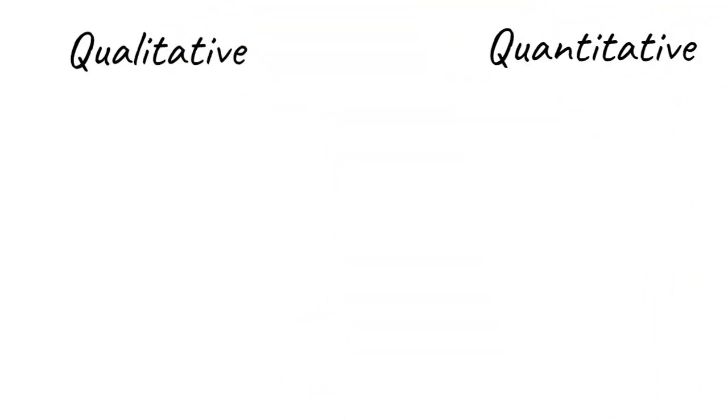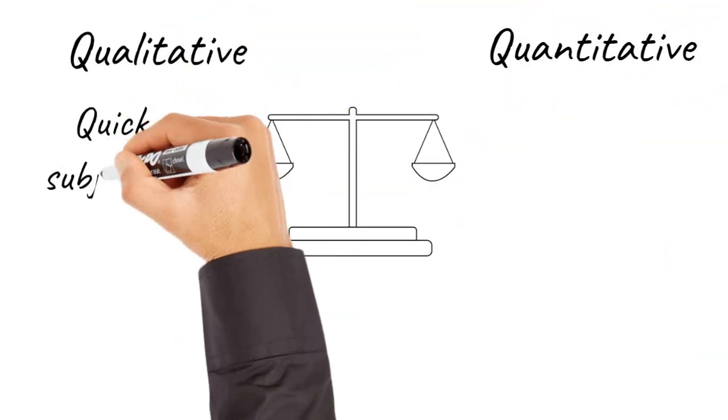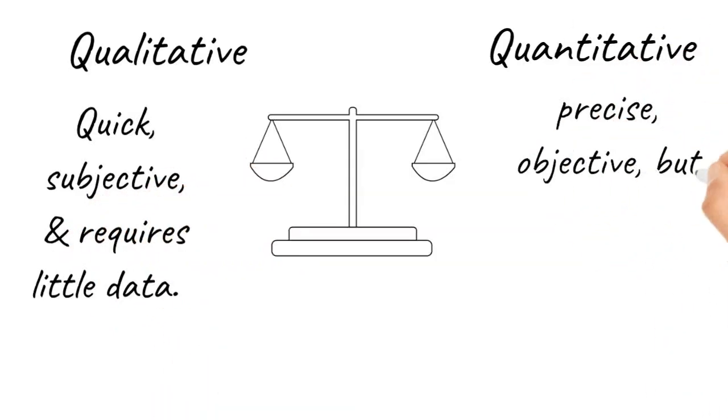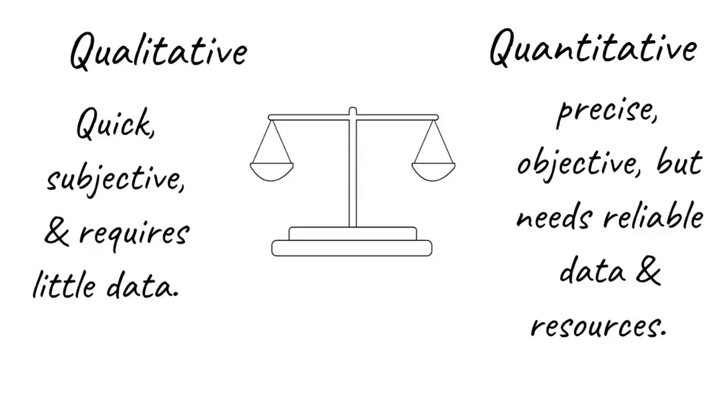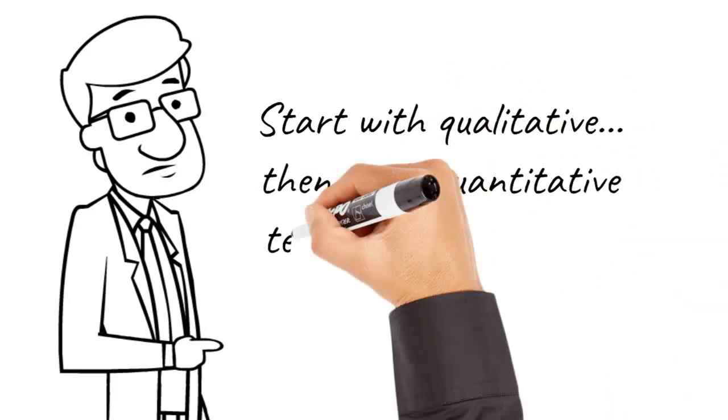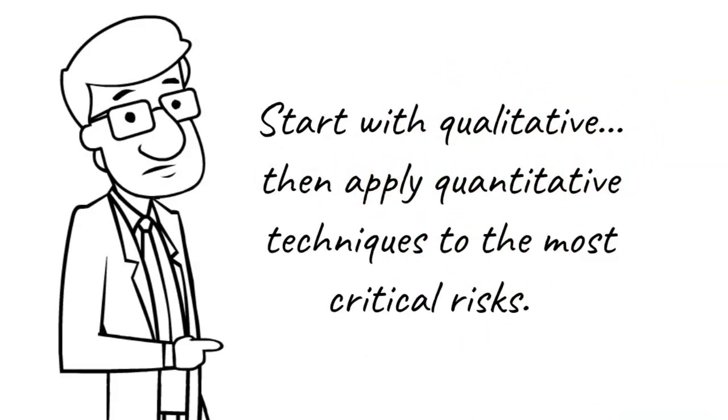So how do qualitative and quantitative compare? Qualitative analysis is quick, subjective, and requires little data. Quantitative analysis is precise, objective, but needs reliable data and resources. Best practice? Start with qualitative, then apply quantitative techniques to the most critical, high-impact risks.